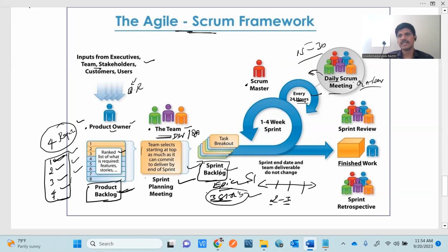Okay, in this scrum meeting, or scrum call, or you can call it a stand up, each and every development team member and testing team member will give their updates to the scrum master. What exactly happened yesterday, meaning what type of work they completed or were doing, what is the plan today, and while doing this work, whether there are any problems, blockers, or issues.